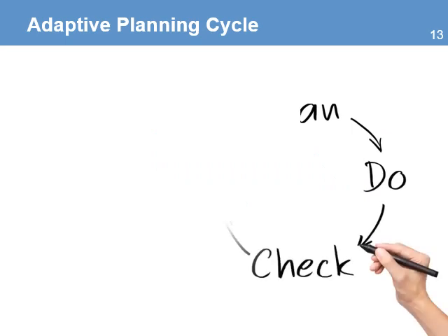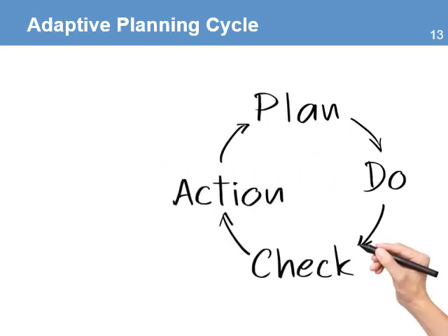In the adaptive cyclical project management, the approach is to use the adaptive planning cycle. The goal is not just to complete your plans, but to plan during the life of the project. In development projects, the moment you start work, you will find that many of the original assumptions and risks have changed. That means that no matter how good your plans are, by the time you've implemented them, there will be changes in the context that will force you to make modifications.